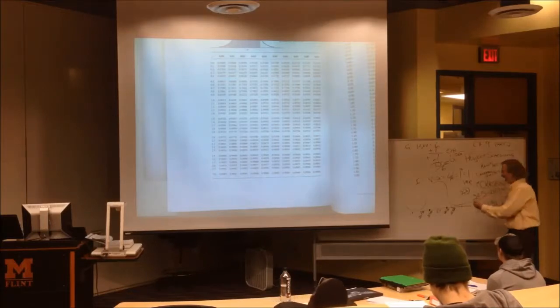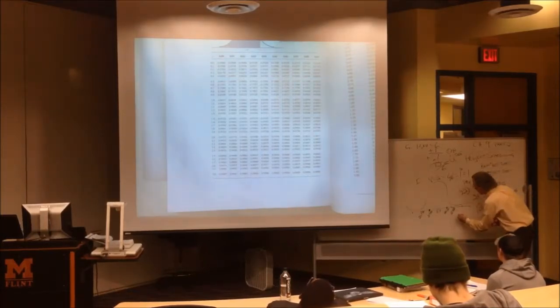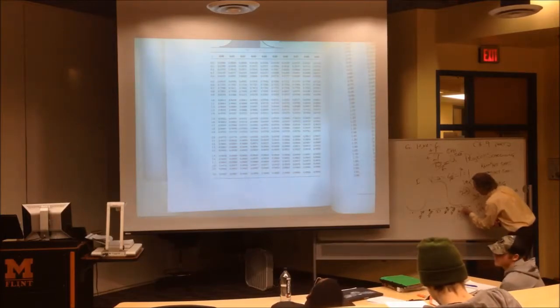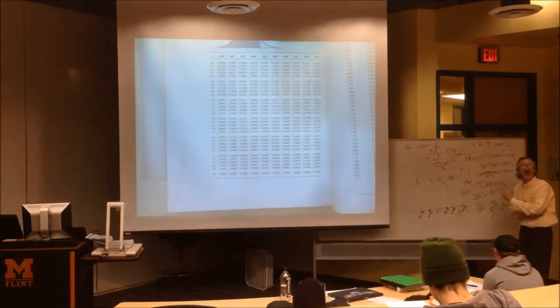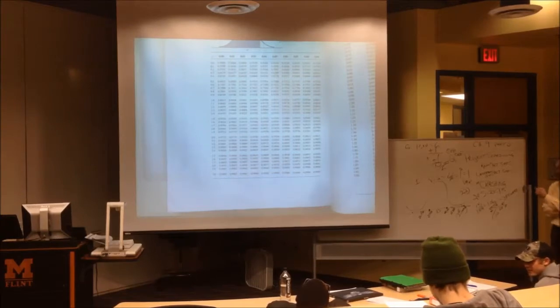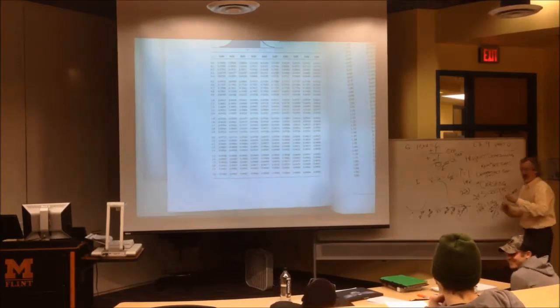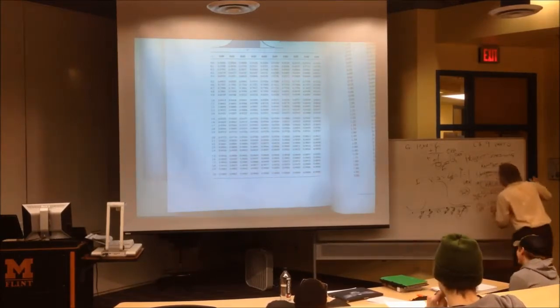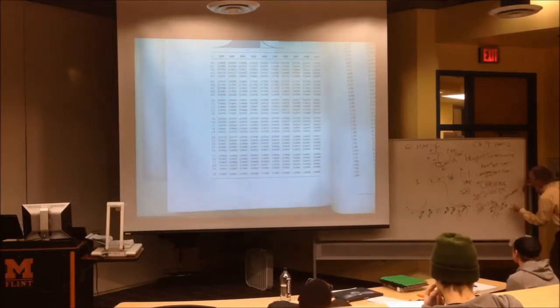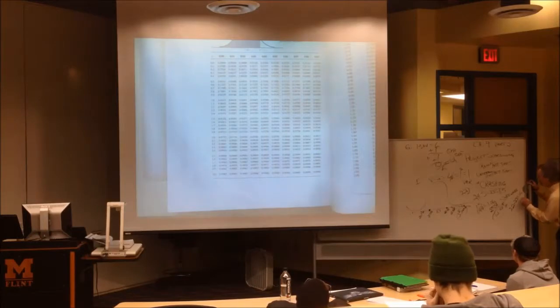I was going to go with 40-ish, or let's go with 35-ish percent. I think it's 35%-ish. Right? Let's try it now. 22 minus 23, it's always what you're being asked about minus the expected time, equals -1. Divided by 1.414 equals